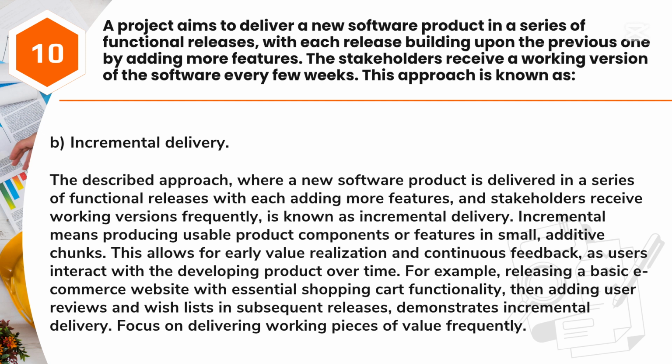For example, releasing a basic e-commerce website with essential shopping cart functionality, then adding user reviews and wish lists in subsequent releases, demonstrates incremental delivery. Focus on delivering working pieces of value frequently.